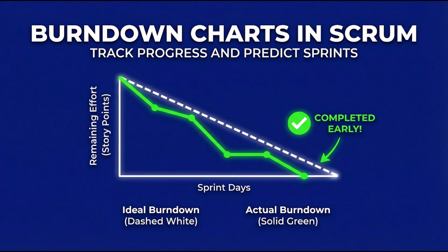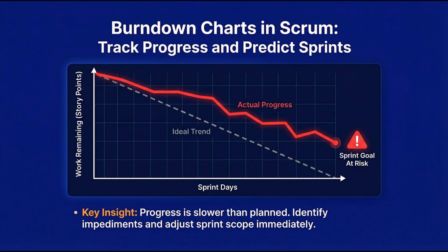Celebrate the success, but discuss increasing sprint commitment by 10 to 15%. Review velocity data to set more ambitious but realistic goals. In our tax system modernization project, one team kept finishing early. We increased their commitment and they maintained the same early finish pattern. They'd been sandbagging.